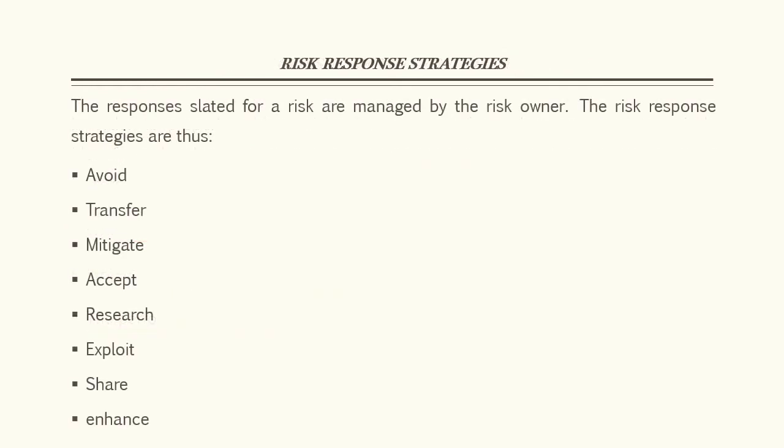Let's take a look at some of the risk response strategies. There are several strategies. We have avoid, transfer, mitigate, accept, research, exploit, share, enhance. Remember, I told you that risk can have positive as well as negative effects on a particular project. And the avoid involves taking action to either reduce the probability of the risk or its impact to zero. In either case, this response enables the risk to be circumvented entirely.